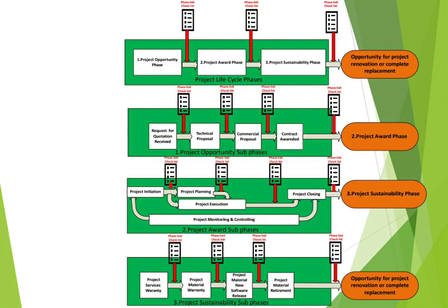After that, the project manager also needs to review this baseline schedule, and a draft copy should be shared with the customer for his review. Maybe also a meeting will be required to discuss this project time schedule.